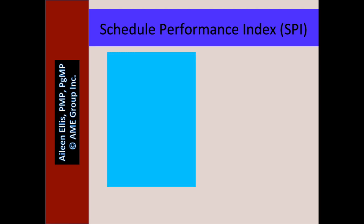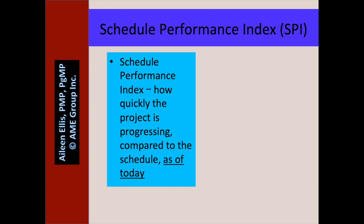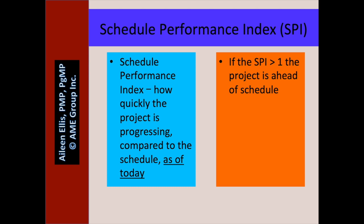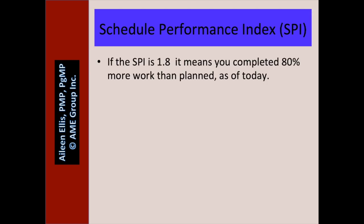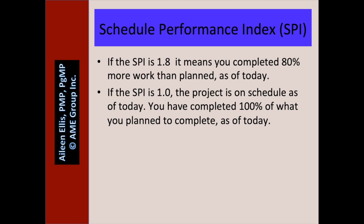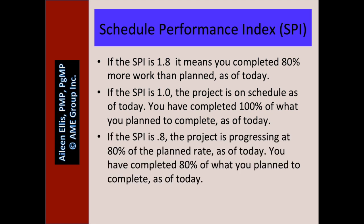Schedule performance index — in my own words — is how quickly the project is progressing compared to the schedule as of today. If the SPI is greater than 1, the project is ahead of schedule. If the SPI equals 1, the project is on schedule. If the SPI is less than 1, the project is behind schedule. For example: if the SPI is 1.8, it means you've completed 80% more work than planned as of today. If the SPI is 0.8, the project is progressing at 80% of the planned rate as of today.